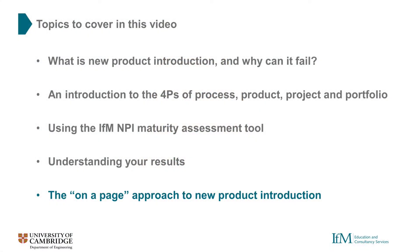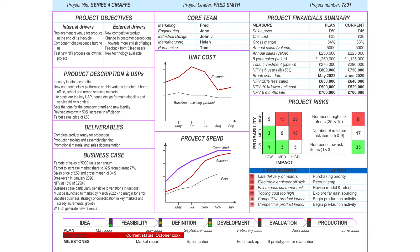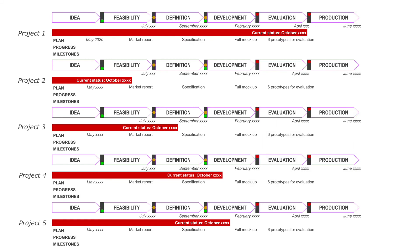One tested and proven way of doing this is through the on-a-page approach developed here at the IFM - a practical way of making sure everyone in your team is on the same page. By organising critical information in the same place in an ordered manner, we can easily track project risks, milestones, and costings, whilst also reminding teams of the original project objectives and business case. Turning to an example portfolio on a page, here we can see a quick and simple overview of our entire project portfolio. This can help us to head off problems such as projects overlapping and competing for priorities, product launches bunching together and causing operational issues, or an inconsistent flow of projects from ideation to delivery.